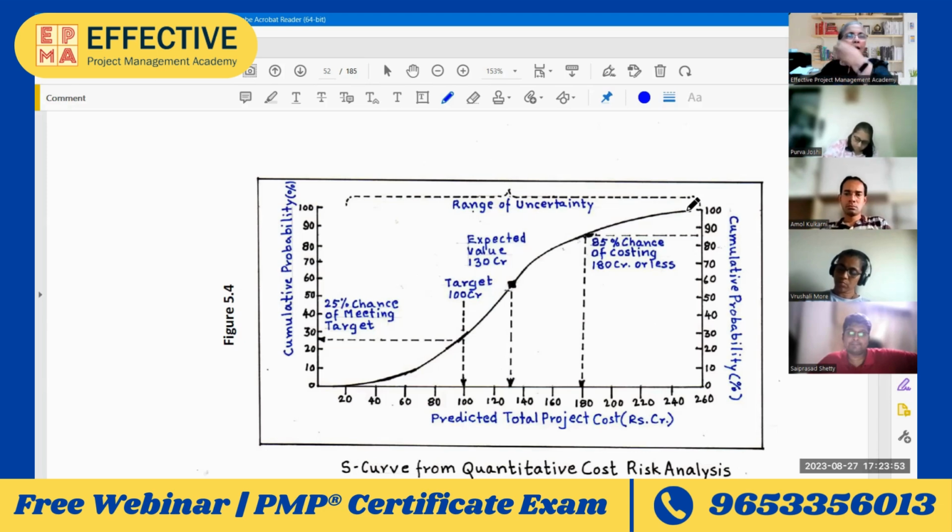How you will increase the spending? So basically, it is a cost graph. And like any cost graph, you can see that it is an S curve. It's not a very curvy S, it's a flat S, but it is an S curve. Cost curves are usually S curves. They have the shape of the English alphabet S.